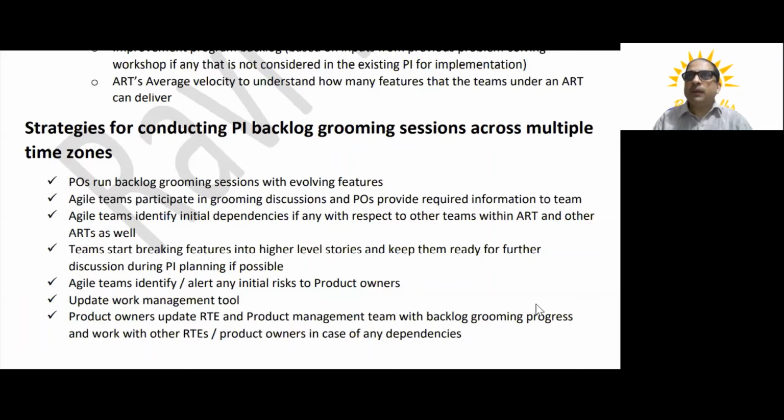Okay, and so in the backlog grooming session, the product owner should be able to explain the feature and allow the team members to ask as many questions as possible. The reason being, the feature backlog grooming session is not just about understanding the feature in detail. It is also important that as part of our discussion, we focus on what kind of dependencies we have, if any, and how to coordinate with them to ensure that the feature gets delivered on time when we commit those features during the PI planning meeting.